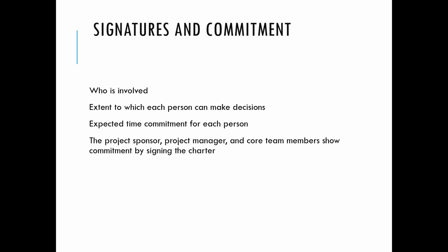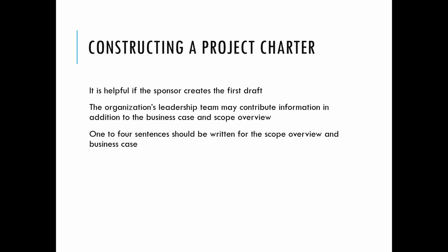And finally, we should have a set contract on who is involved, the extent to which each person can make decisions, and the expected time commitment for each person. The project sponsor, project manager, and the core team members show their commitment by signing the project charter. It is helpful if the sponsor creates the first draft of the project charter. The organization's leadership team may contribute information in addition to the business case and the scope review. One to four sentences should be written for the scope review, overview, and the business case.